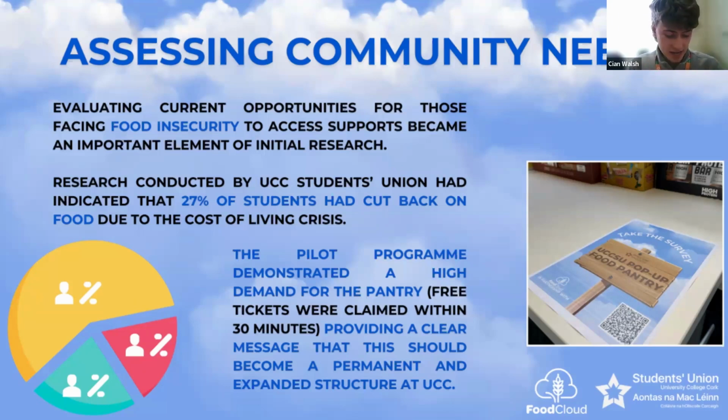And really the next step in our process was actually to have the pilot program, which would really be the determinant of whether or not there was a community need for this program. And what we found is, while the pilot program was small, we had a very high scale of demand, where students were claiming the 50 or so tickets within 30 minutes or less upon their release, a week before each pop-up where students could avail of food. That for us has been the clearest indicator that this needed to become a permanent initiative.